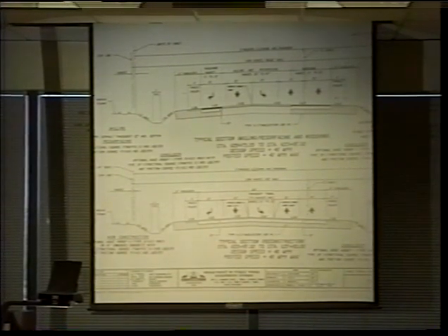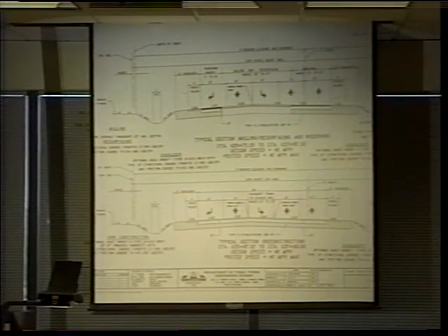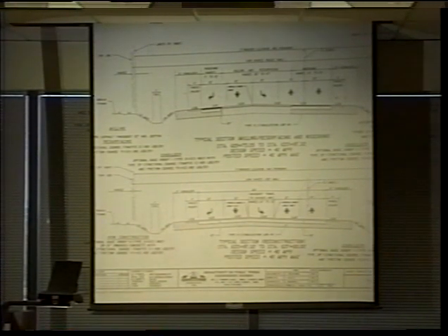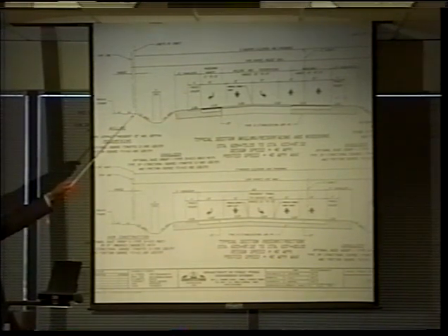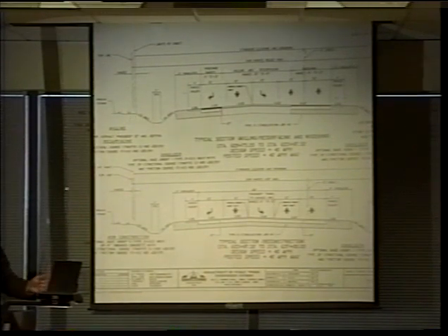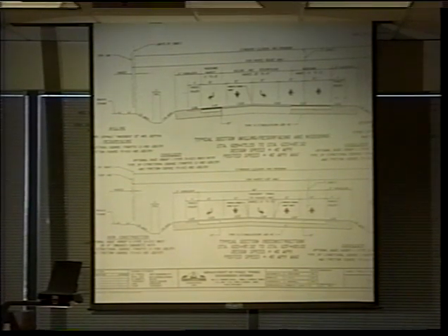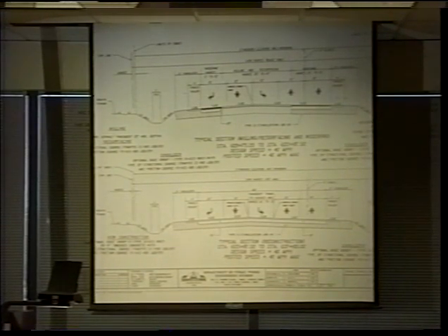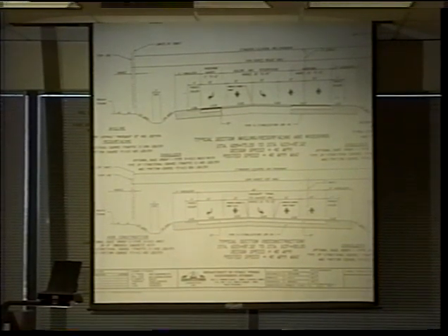So the clearing and grubbing or the excavation of the ditch or the recovery of the back slope of the ditch, where the back slope of the ditch meets and matches existing grade conditions, all that occurs here within the limits of construction, which fall within the limits of the right-of-way. That's a good thing. When the limits of construction go beyond the right-of-way limits, that's not a good thing. Or it could be a great thing, depending upon who you represent. It could be wonderful.